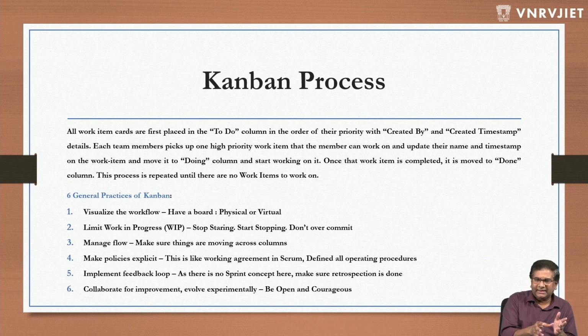because if you are working on a ticket for a priority customer, which is high priority, you should finish it whatever it takes, because the customer is waiting on the ticket, right? So that's very, very important. So you don't take up another one because you are blocked. Make sure that it's unblocked very quickly, or just put it back to the backlog. Don't work on multiple things at the same time. That's what the second point is.